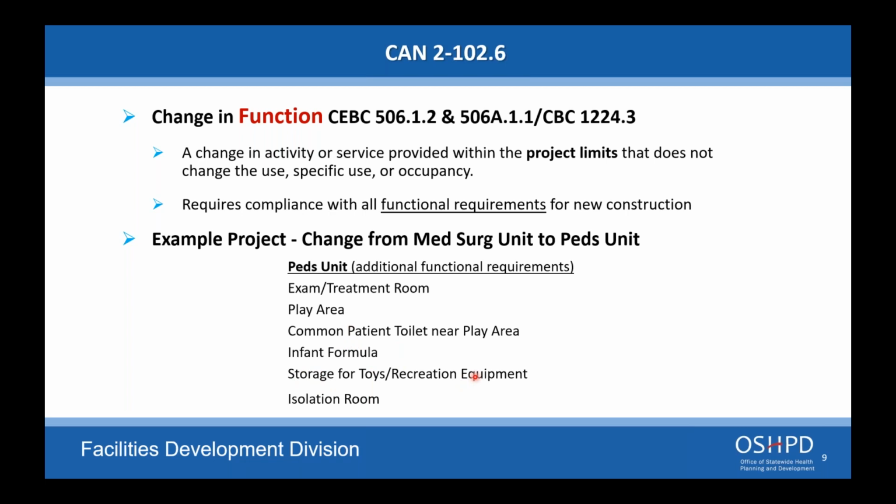What you do not have to do is upgrade the patient rooms, soiled, clean utility rooms. All the existing functions that are remaining and they're not being otherwise touched do not need to be upgraded. If you're going from pediatric to med-surg, you can conceivably, and we have done that without any construction.